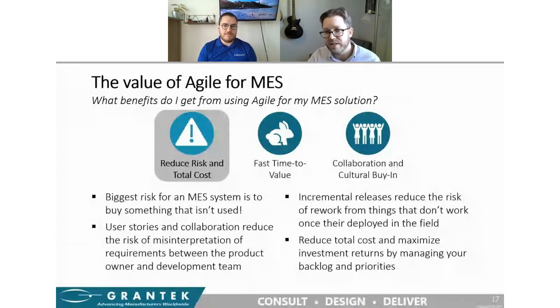used. I've unfortunately seen this before, oftentimes when management is solely responsible for defining requirements without sufficient operator input, leading to abandoned systems that don't provide any return to the end customer. Another common MES risk is misinterpretation of requirements. I'm sure you've all seen examples where a requirement wasn't detailed enough to convey its true purpose, or where a deliverable is technically right according to the requirements but doesn't meet the true need. User stories and constant collaboration significantly reduce that risk.